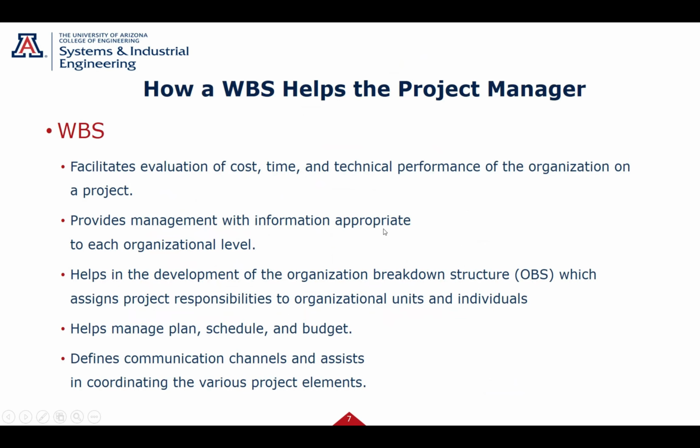It provides management with the appropriate information for each level, and helps in the development of the organizational breakdown structure. Okay, we'll get into that in a minute, but what's the difference? Work breakdown structure defines the work I have to do. We're going to map that to an organizational breakdown structure. Which organization needs to do each piece?